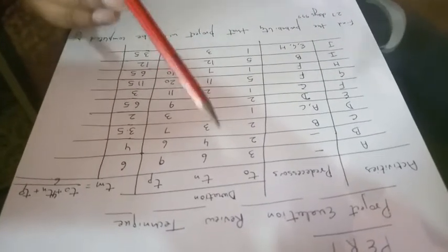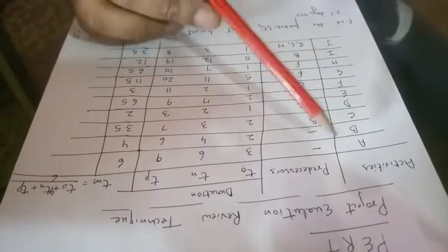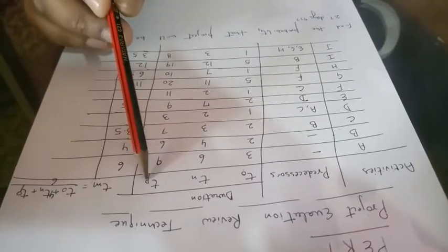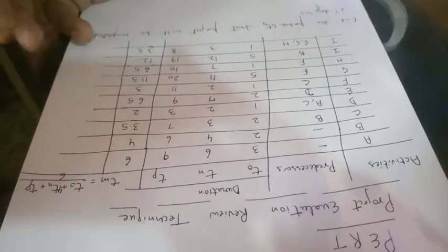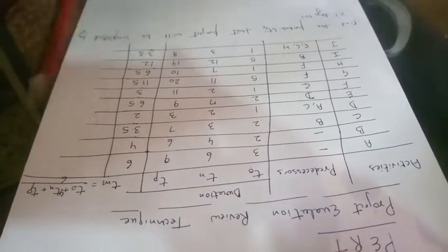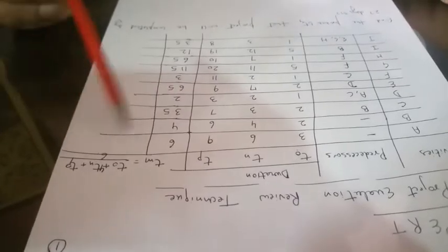As we have discussed earlier, optimistic is the minimum time the activity takes, normal is the normal time, and TP is the pessimistic time, the maximum time the activity can take. So we have the three estimates of each activity, and then we record the mean time, the average time, with this formula: T optimistic plus 4 times T normal plus T pessimistic, divided by 6. I have calculated this T mean by applying T optimistic, T normal and T pessimistic in this formula. We get these figures.